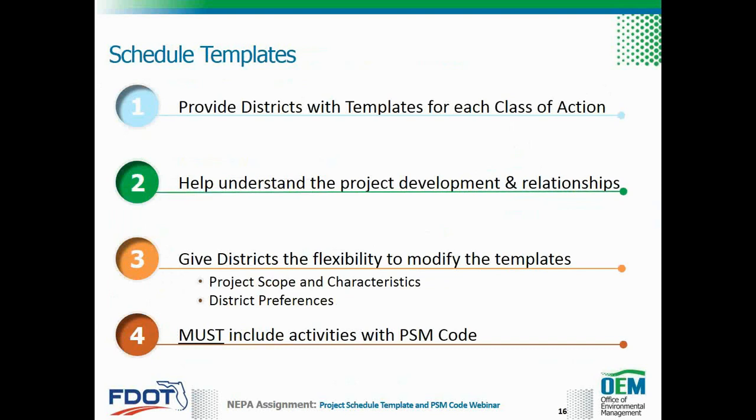For example, I used to work at Florida's Turnpike, and all our traffic forecasting was prepared by our traffic and revenue consultant, and the no-build traffic and analysis was prepared before the PD&E consultant was selected. So if you have certain district preferences, feel free to add them to the schedule. The one thing that we do ask is that you do not delete any applicable activities that have a PSM